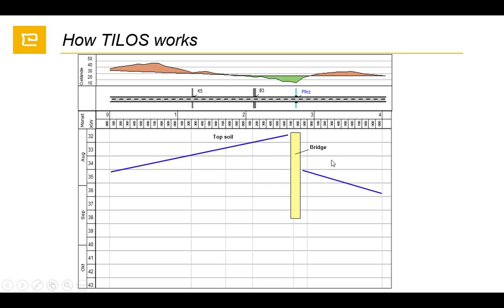We can add structural works like bridge works. When we would like to show the detail, we can show it in detail too. So this means that at 2700 there is bridge work. For level 1 we are showing the overall bridge, which is good for the tendering stage, for example. Later, when you would like the detail, it is good to see what the activities are, like foundation, erection or decking activities inside this bridge work.